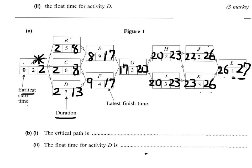C, 2 plus 6 is 8. No leeway. So C is a critical activity.